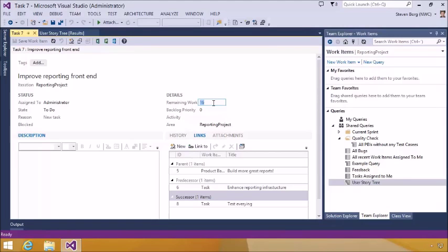Now, as a TFS administrator, you might be called on to create additional linkages between Project and TFS for new custom fields, for example. You can do that in the process template itself. There's a whole way to make that change occur. It's one of the XML files. It just says, here's the source, here's the target, and here's how they should be linked between the two. Again, more advanced usage, just wanted to let you know that that was possible. And that's how we've established that linkage between Project and Team Foundation Server.